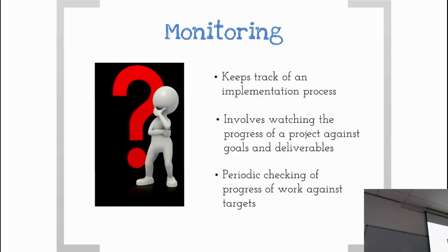There is the periodic checking of progress of work against targets. And again, in many projects you will have various stages which you formally have to assess. So if you work on a public sector project, for instance, I used to work quite a lot in local government, big local government projects, you will have what we call gateway reviews, where you have to write a report at certain points during the project to say to the funders, you are where you're supposed to be.